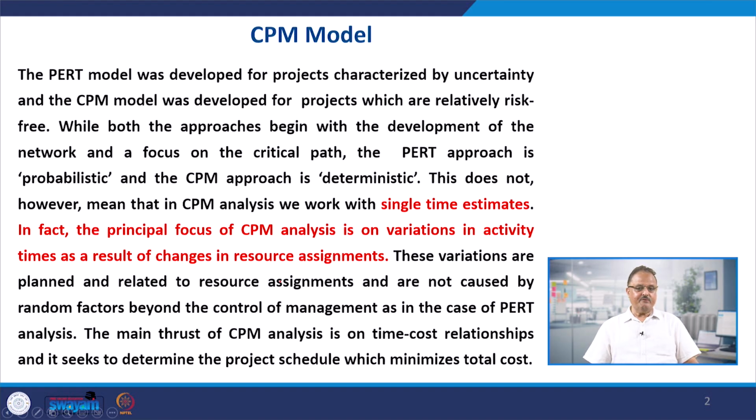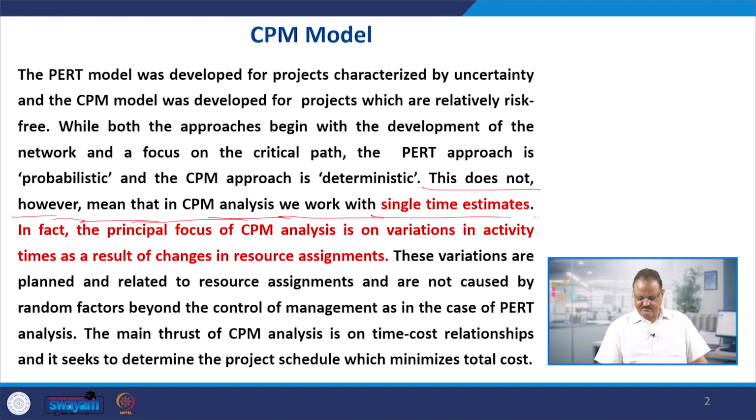This does not, however, mean, and be careful about this part, that in CPM analysis we have single time estimates. That's not the case. We can have multiple time estimates also, and in fact the principal focus of CPM analysis is on variations in activity times as a result of changes in resource assignment. So we try to find out how much time we can vary, how much time we can reduce.